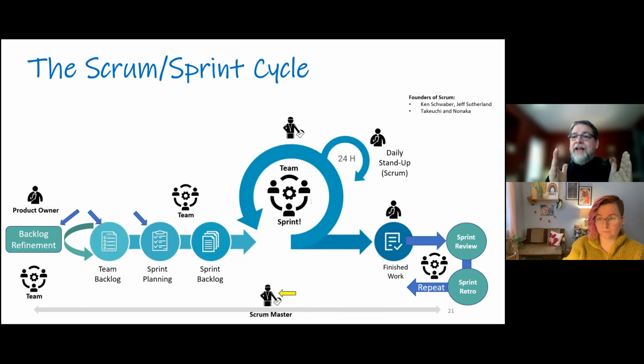You may have heard that. So the longer the sprint cycle I have, the more inefficient that process will be. It'll take longer for me to learn something I need to learn. So we try to optimize it down to a point where we don't get silly about it. But a couple weeks is, for most teams at the point of maturity, a good balance.